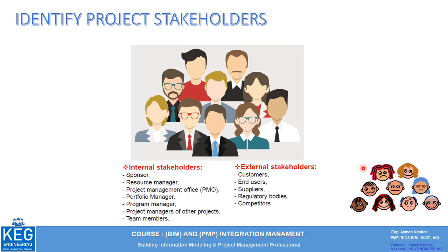For external stakeholders, it may be the government, the end users, the customers, the people who will use the product after it is finished, maybe the competitors, or other companies working in competition in the market. So there are a lot of stakeholders I should take into consideration during initiation. During the initiation process, we should first start with developing the project charter, then go on to identify the project stakeholders.